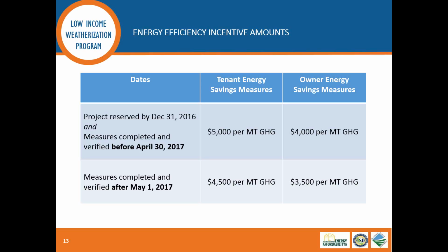Just at the measure level, we don't need to break it down to too granular a level for a specific measure, but we just need to know how much was the water heater, how much was the lighting, and how much was the roof, so that we know the actual measure cost. So that's definitely going to apply to your GC projects, or projects where the contractor is doing multiple measures. We'll at least need that line item pricing for each of those measures. Great.